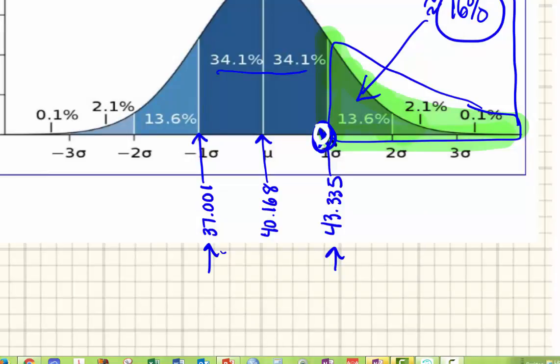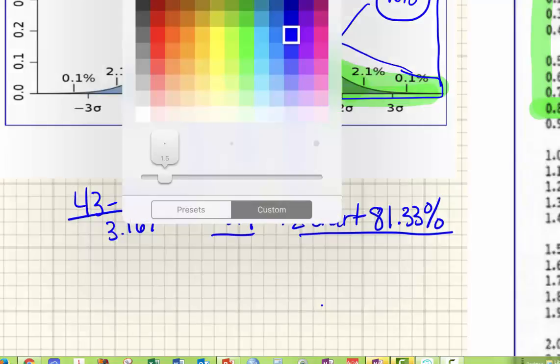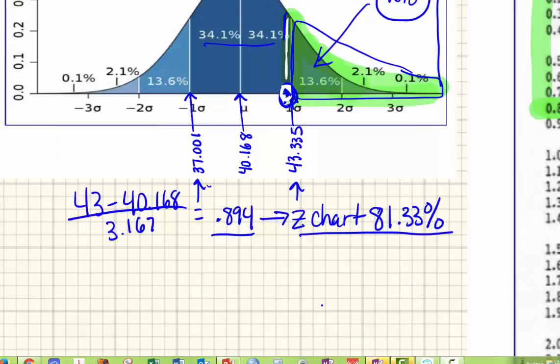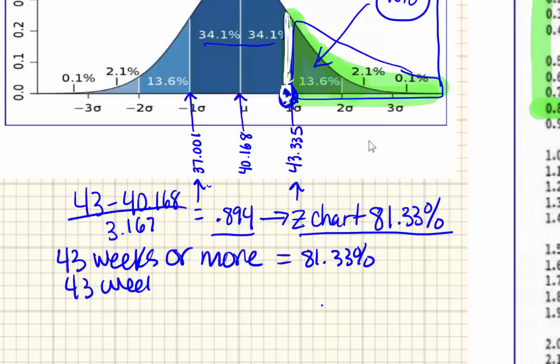So we do our calculation and we get this 0.894. That's the number we looked up on the Z-chart. We look it up and we get this 81.33%. So if we were right on the line here, right at one standard deviation, we would say about 84%. But since we're just shifted to the left, because this is so much of the curve here, it drops it all the way down to 81. So if the question was 43 weeks or more, the answer would be 81.33%. Since we're asking for 43 weeks or less, the answer is 1 minus 0.8133, which equals right about 19%.